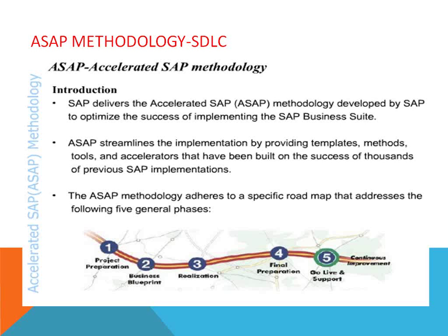Based on the SAP education, how SAP works and how the reports work, we take the information and present it in the form, and the general audience is also there, from higher executives to lower executives and the working people. This way we grab the information, we document the information, and the business blueprint document is prepared. Once the business blueprint document has been prepared, we put all the information into the system. It's called configuration. We put in all the configuration in the realization phase.